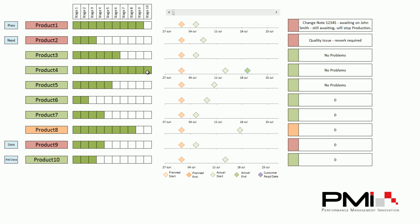We've also got a RAG status to show any particular problems during production. We can see product 1, even though it's almost complete, has got a red colour here with a note saying there's a change note issue waiting on John Smith that will stop production. So you can immediately see that it's probably not going to progress and complete until this change note has been sorted.